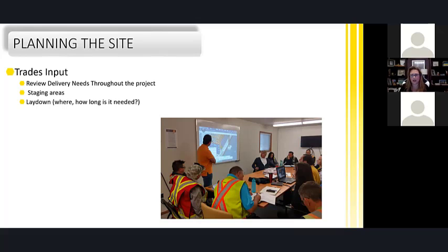Here in Vancouver, we have to do strategic planning with the City of Vancouver in order to identify how our trucking routes are going to come into the city, because they have lots of infrastructure projects going on. So we now are constrained in at least 6 different communities where we have to communicate clearly what our project is going to look like throughout the entire time we're building and where trucking is going to be coming from.